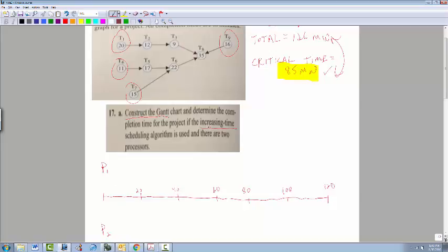So, increasing time, we pick the smallest of the ready tasks. The smallest of the ready tasks is T4. So, processor 1 is going to do 11 minutes doing T4. And that's a little bit more than 10. I could cut this in half again and know that that's 11. So they're going to do T4. Let's see how we put that. We could put T4 here, and then the minutes is in the graph. So T4 is being done, and it's going to take them 11 minutes.